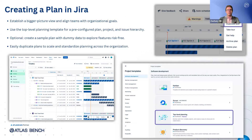Creating a plan in JIRA is about connecting the dots between what individual teams do and the broader organizational goals they support. The simplest way to get started is with Atlassian's top-level planning template, which provides a ready-made plan, project, and issue hierarchy. This approach helps your teams hit the ground running, especially when managing large cross-functional efforts like a new product launch or a major initiative. If you're unsure where to begin, you can also start with a sample plan that uses dummy data so you can experiment freely without impacting any real work. Once you've designed a plan that fits your team's processes and structure, it's easy to scale — just duplicate the plan to reuse it for similar projects or to spread agile planning best practices across multiple teams and initiatives.